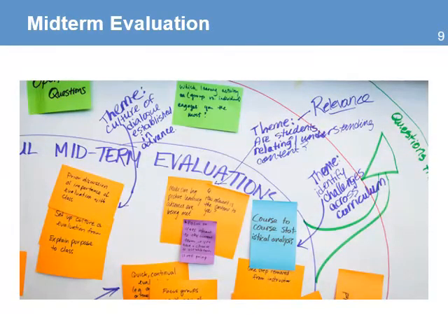Midterm evaluations are an excellent opportunity to get valuable information that can help determine the status of the project. Most midterm evaluations focus on process, which is the evaluation of the efficiency of the project in completing the activities and delivering the planned outputs. The midterm evaluation findings will include recommendations for changes in the project, especially on areas to improve the efficiency. This might include training of team members, improvements in communications, increased participation of stakeholders, and changes to plans to reduce risk and avoid waste of resources.